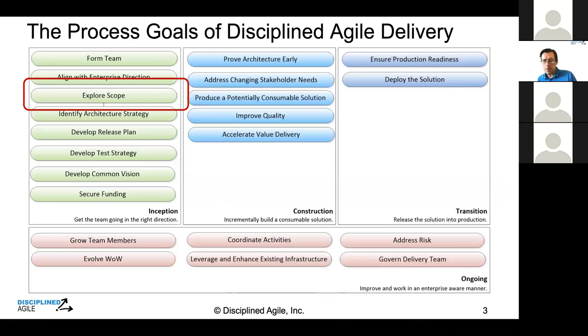I would say, technical work should be put into a work item list and written in whichever format makes sense for you and that is consumable by the people who need to understand what's in that backlog or work item list, and prioritize the work, size it. So it should be written in the terminology of the people who are responsible for the prioritization of that work.